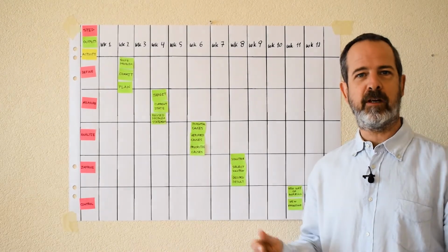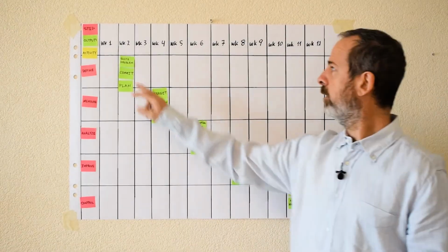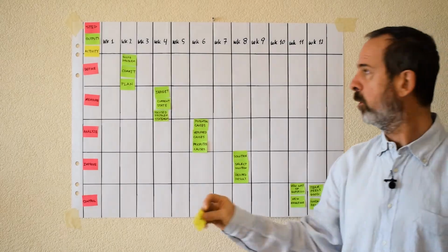Take care to realistically plan the duration of the different activities to minimize wishful thinking for your timelines. To help you and your team with resources, you can also see if there are activities that people outside of the team might be able to help you with. The next step is to detail out the activities in order to accomplish the deliverables. For example, to scope the problem, you and your team will make a SIPOC.